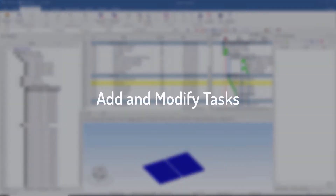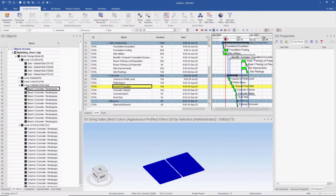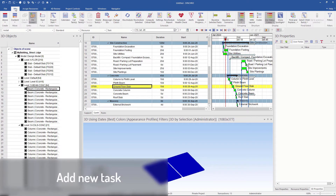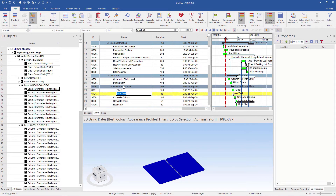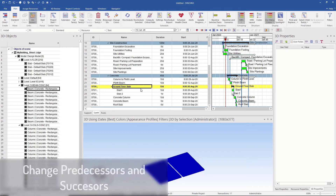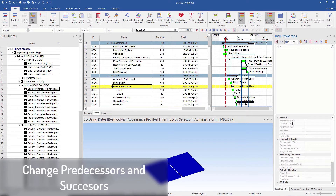In Synchro Pro we can edit existing tasks or add new tasks. I will add a new task under the currently selected task, which is Ground Force Lab. I go to Plan and then select As Child. A new task is added — I name it Slab1. Then I add another one and name it Slab2. We can check predecessors and successors of a task by going to Task Property and then Link.